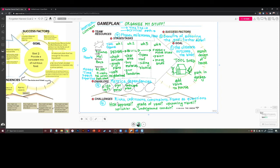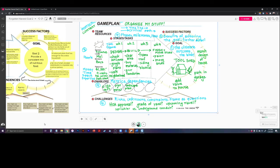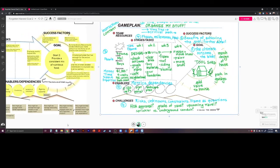Challenges, of course, are the risks, unknowns, constraints. What I like to do is frame these as how might we questions. If I'm worried that the HOA is not going to approve my tool shed, I'd ask: how might I ensure that the HOA is going to approve the tool shed? If I'm not sure about the grade of the yard, how might I correct the grade of the yard? What if upcoming travel gets in the way? How do I make sure upcoming travel does not get in the way? So that just uses a little bit of positive psychology there.